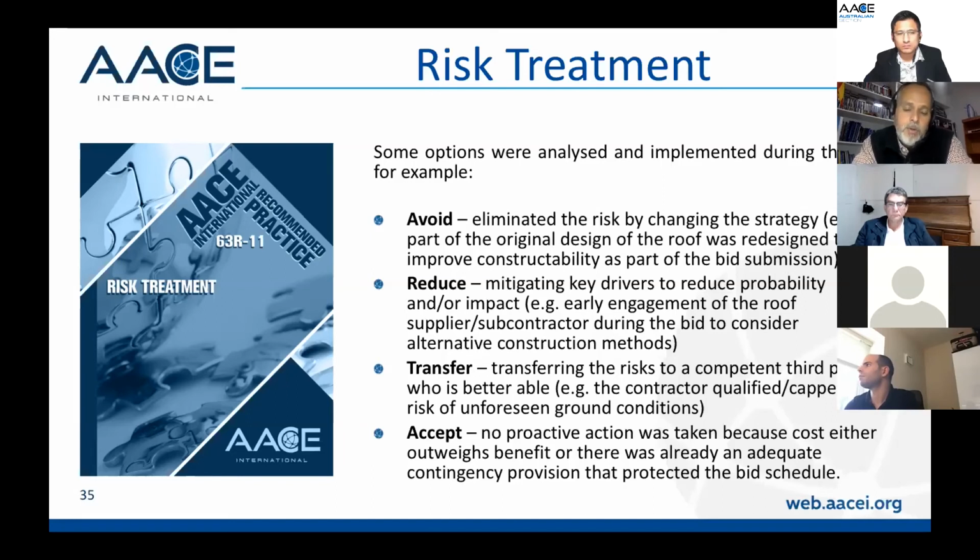And then you have some risks where you have no option but to accept the risk. So if you are working in a place where you have a shortage of resources, you need to accept that because you need to comply with the local content. That's what you need to do. You just need to plan the job around this sort of risk.